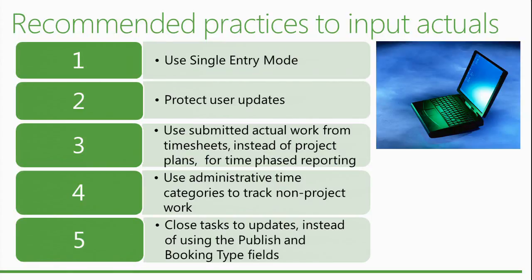So the first one is to try to use single entry mode. The second one is to protect the user updates. We saw that setting to avoid having the project manager or someone else who has the permissions override the end user updates. Another one is to use the submitted actual work from the timesheet instead of the project plan for time phase reporting, so it has to do with the way the information flows through the system.